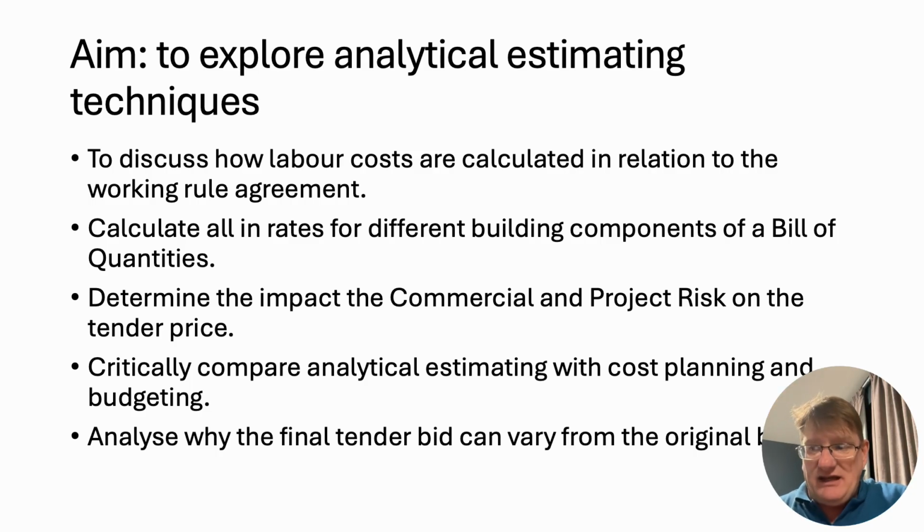So there's your plant, there's your materials, and then how much labour do you need? And again, it's an educated guess. It's looking at the site. We know that it's a raft foundation, so it's got to be poured quite straight and put in straight away. So you're going to need at least 2 or 3 labourers and a vibro compactor. I call it a vibro compactor, a vibrator basically, to get all the air out.